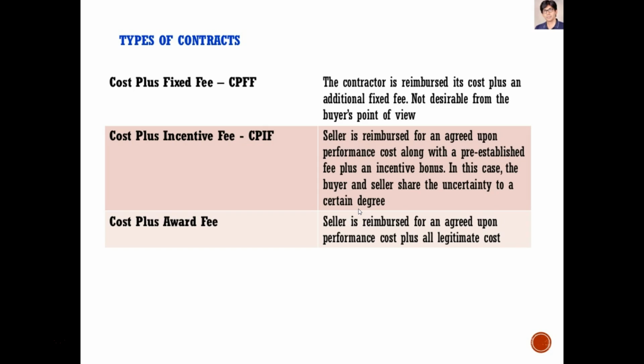So that takes a lot of equipment. It takes a lot of man hours. It takes a lot of all kinds of other things. We ran into the Department of Environmental Quality and had some marshlands that were set aside for some birds. And we had a contract with AT&T to do this project. The original contract was for a set price per foot. And so this was going to be about a $300,000 build originally.